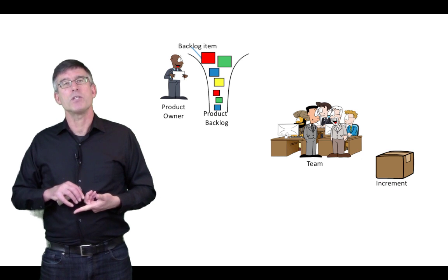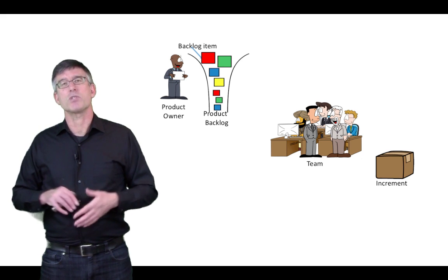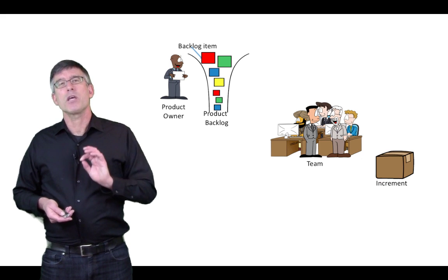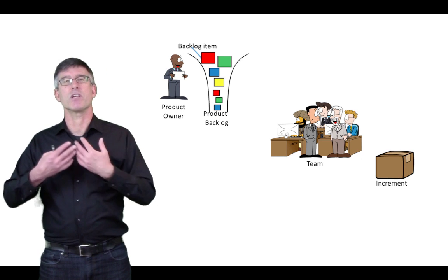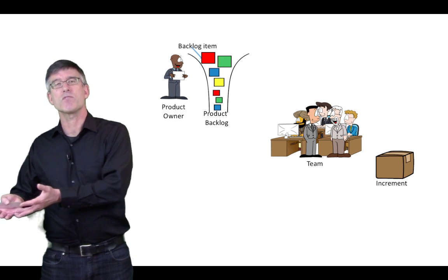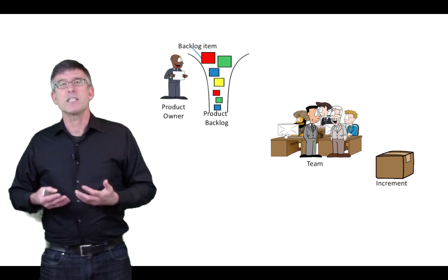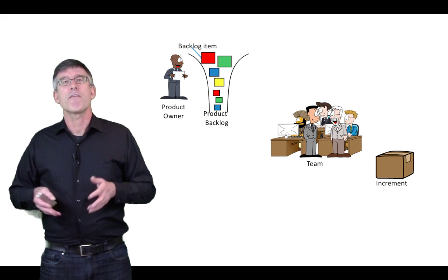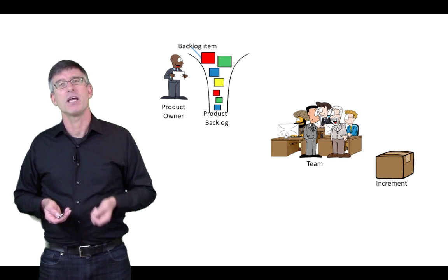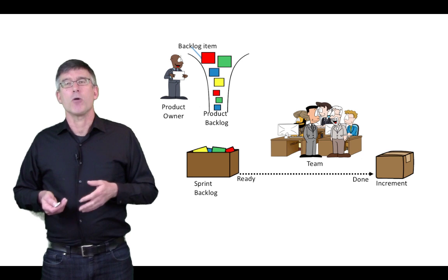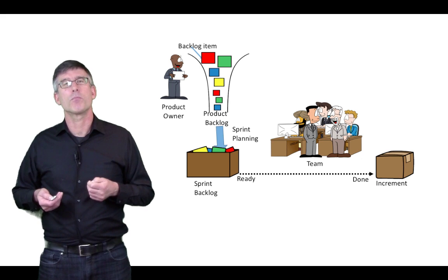And that in Scrum means we organize our teams as cross-functional, multidisciplinary teams that collaborate together. One thing that we do not do in Scrum is try to organize our teams as having a team of BAs, and then a team of programmers, and then a team of testers, and a team of release managers, because that defeats the intention behind Scrum. We're looking at a very tight, fast-moving, collaborative team who's fully capable of taking work from that product backlog and turning it into an increment. Now, the way the team works is they don't directly pull the work from that product backlog.